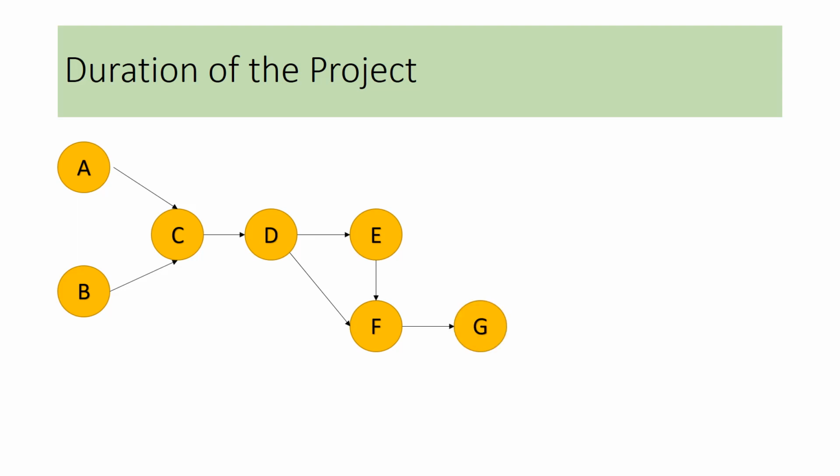We couldn't have started task G without completing task F, and the last phase, which is closing of the project, depended on the completion of task G. Now, each task that is listed here has its own duration. In the network diagram that you're seeing in front of you, the tasks are represented in the form of nodes, and the nodes are connected with arrows.